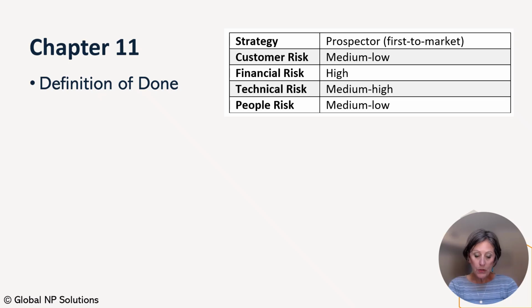While acceptance criteria are generated for each individual user story, done criteria are standardized across a project or the entire organization. Unfortunately, many teams fail to define done, and quality of products launched into the marketplace then suffers. Low quality products require fixes and rework so that resources end up committed to maintenance work instead of revenue generating new product development work.